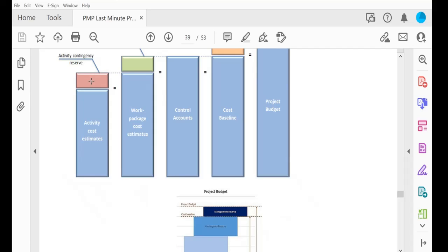Yeah. So for example, I said, okay, for the painting, we need 2 liters, but for the risk, we already added 3 liters. And at the end, when everything is done, we say there may be some risk, we need to add 1 more liter. Is it viable? No, it's not viable, because you already added one extra. So management reserve is usually for the unknown risk. Something is happening and it is beyond our control. Then we bring the management reserve.